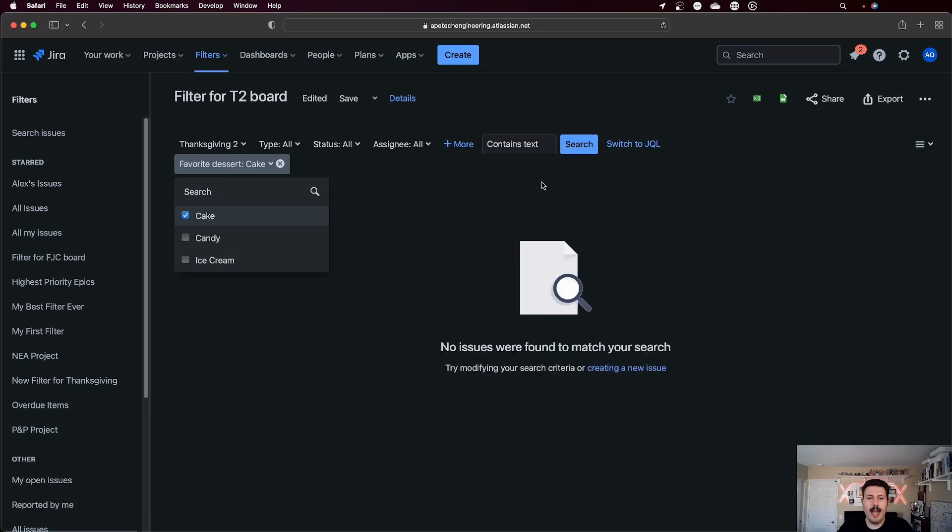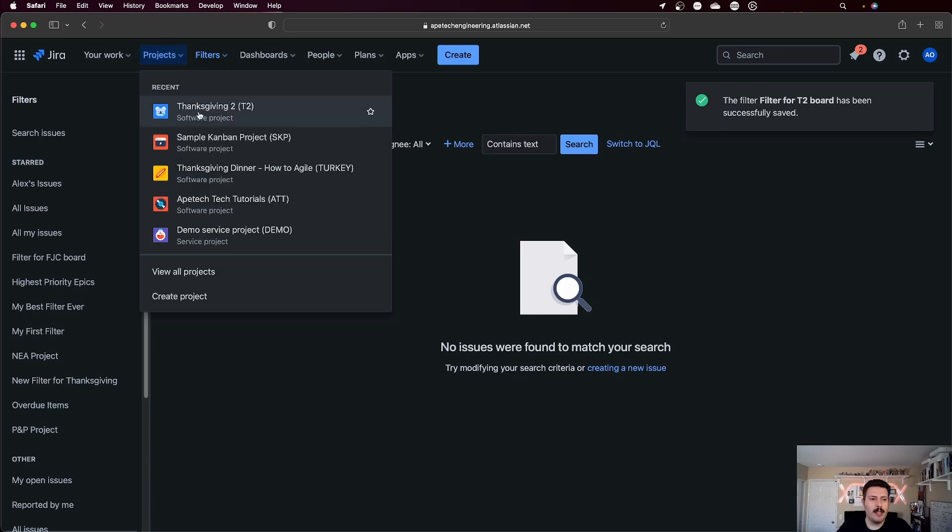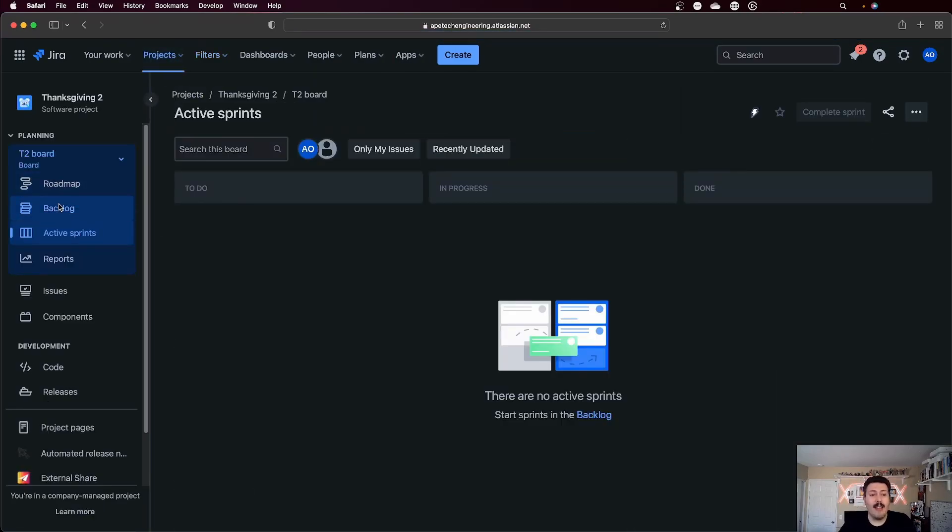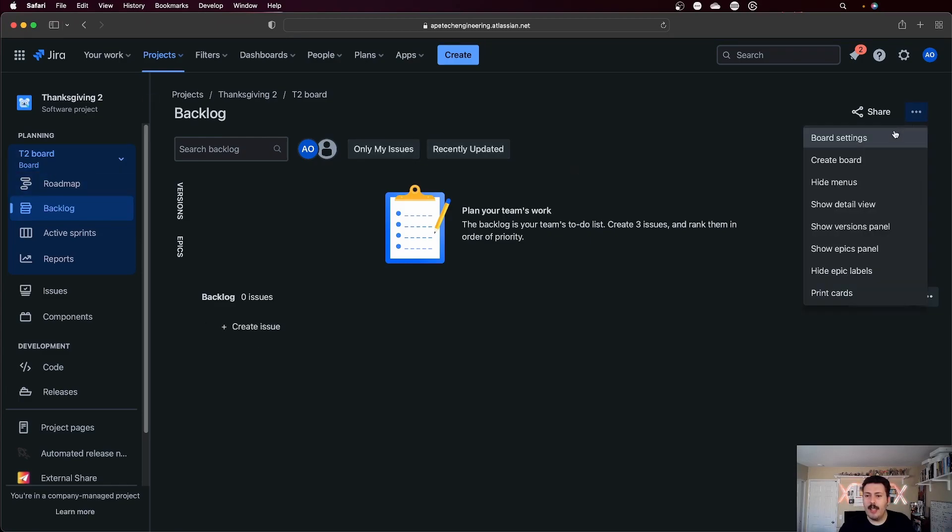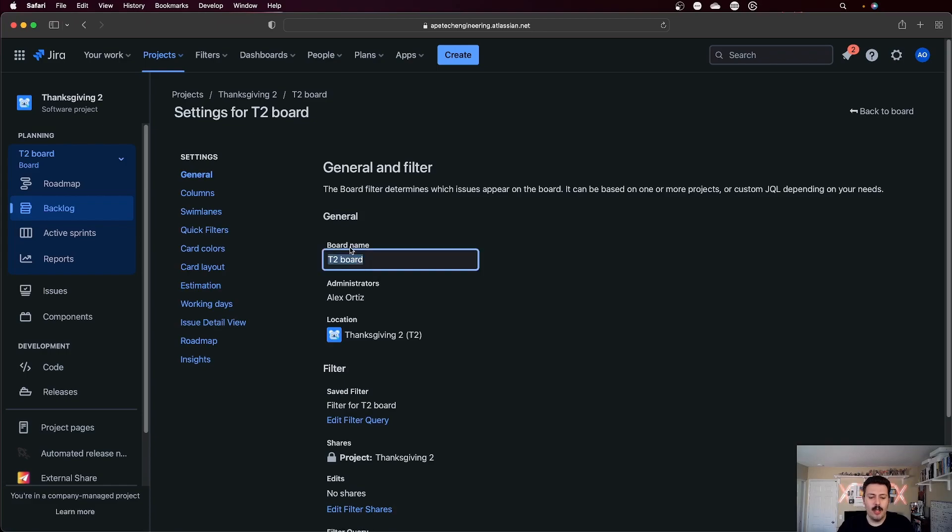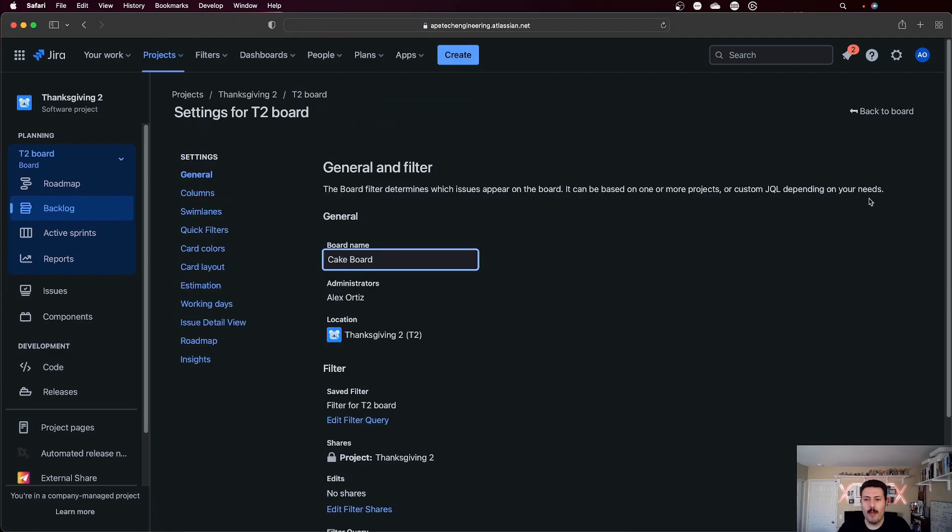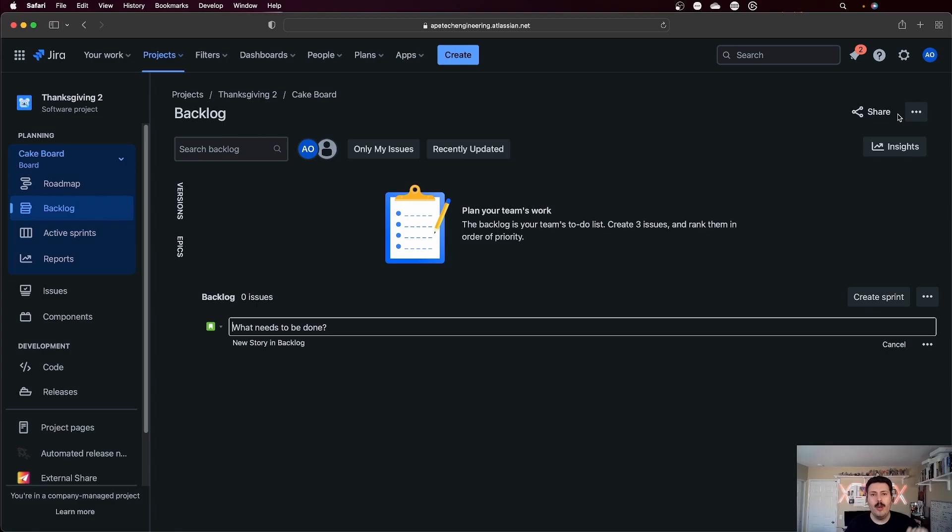I can do this and hit save. And so when I do that and I go back to my projects, this is probably going to show me nothing because I have essentially kicked everything out. But I can also now rename this board here instead of being the T2 board to be the cake board. Because only the issues that are in this project and favorite dessert equals cake are going to show up here. And so you might've guessed it. Now I can make a board for all my other desserts. And so the cakes are going to go in one, the chocolates are going to go in another, and you get to determine how that setup happens.